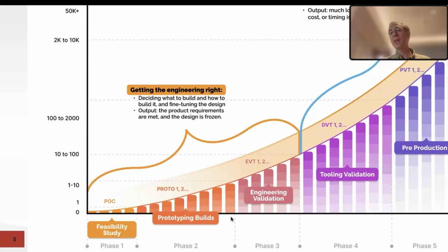Maybe tooling, maybe soft tooling, if the quality level is very high, or maybe it's medical. In some cases, it becomes necessary. Maybe it's going to be very high quantity. Anyway, it does warrant the fabrication of tooling already at that stage. Now, obviously, what is that tooling? What's the design of the tooling? What's maybe the DFM review by the tooling designers and the tool fabrication team? All of that would make sense if tooling is made at this point.